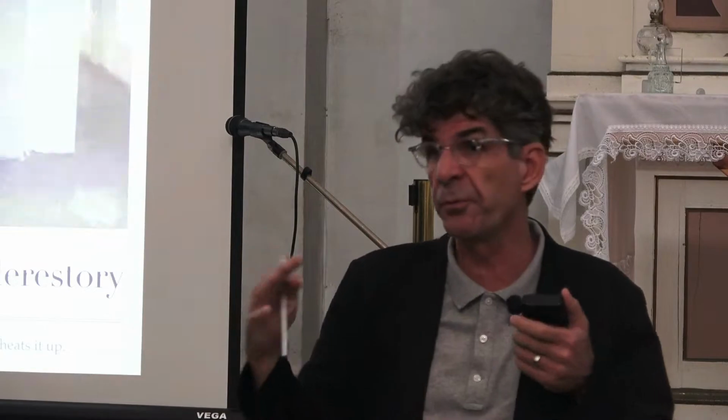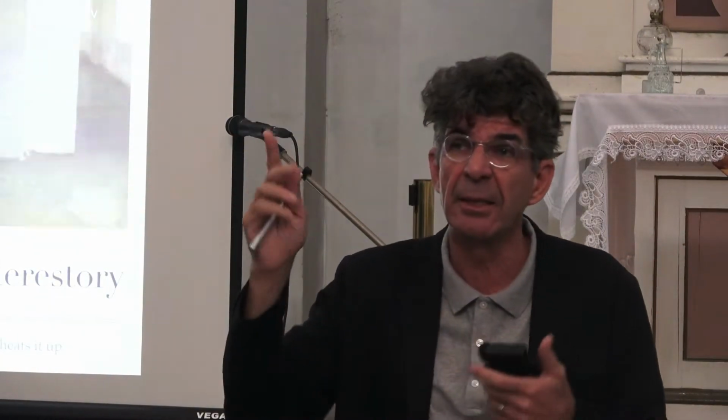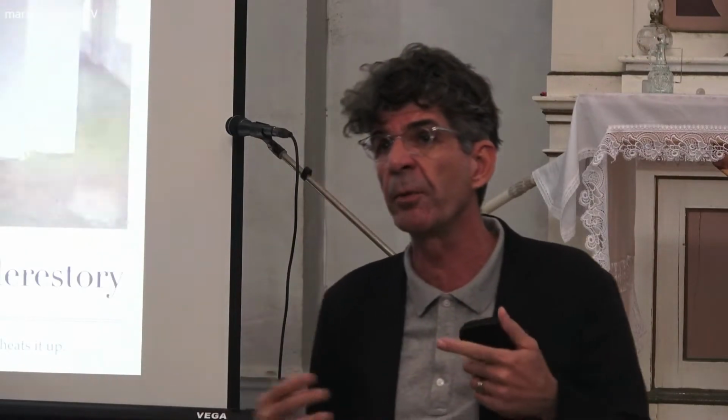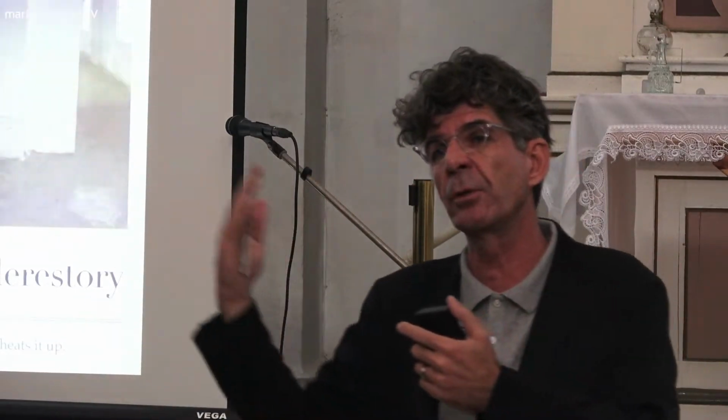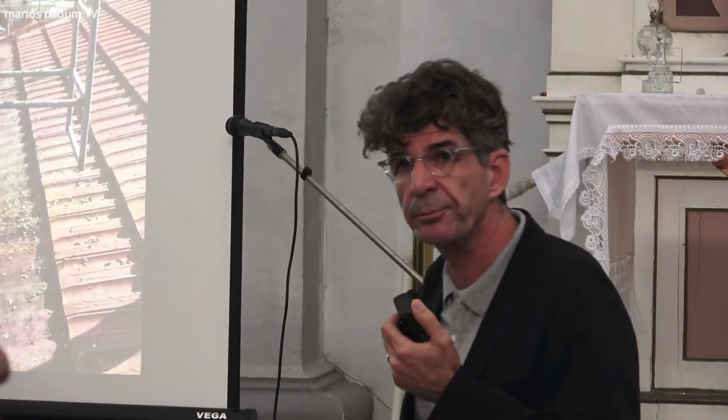This is our wish list. We want everything to be done, and this is our wish list. And when the quantity surveyor gives us some estimates of how much it's going to cost, we're going to phase it. Say the budget is X, and we have to meet that X number, so we can phase the work accordingly. We can do interior first, we can do some of the exterior, we can do doors, those kinds of things. Our schedule.